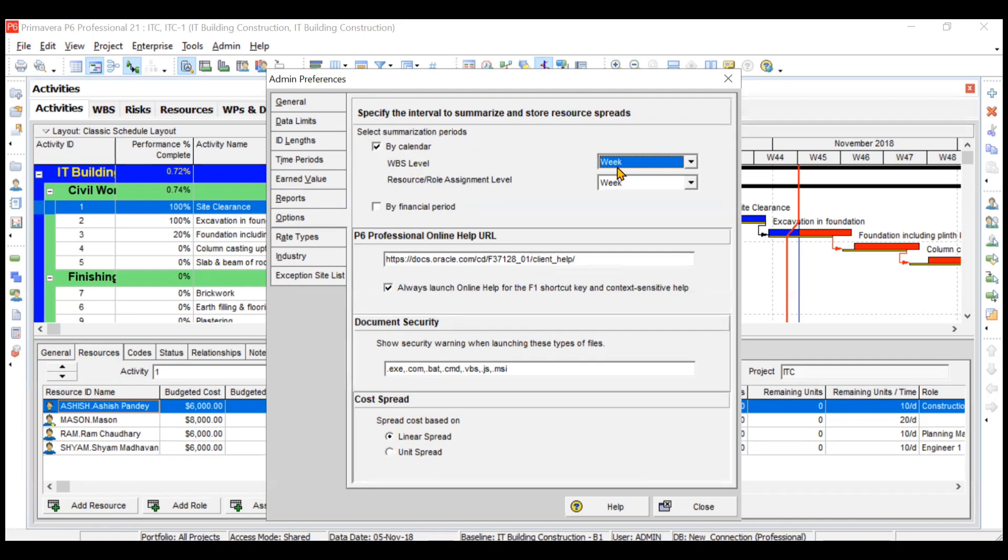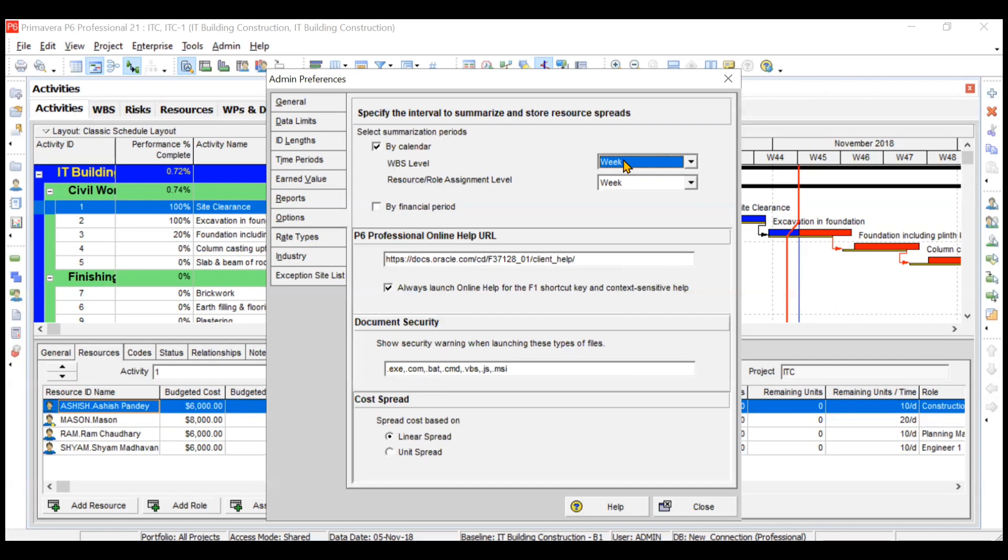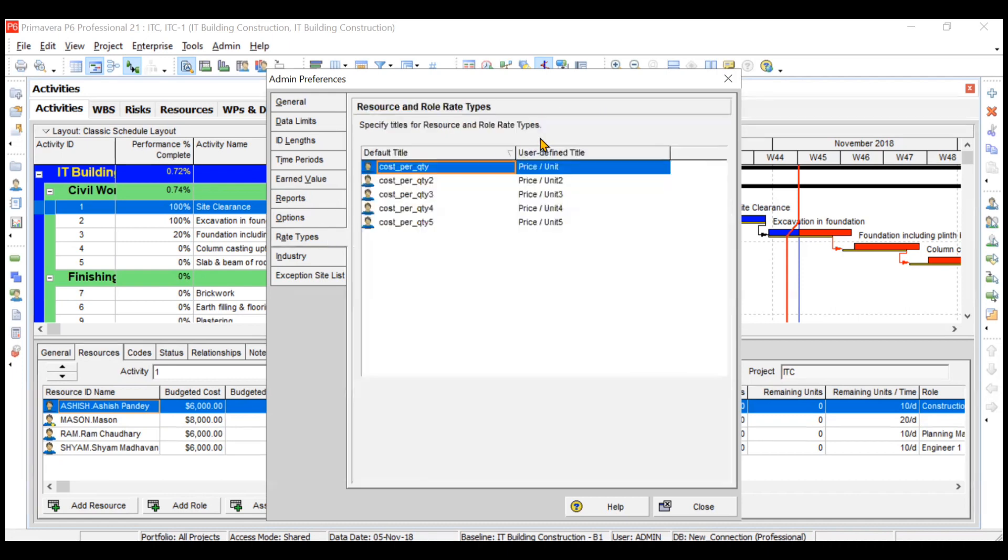Here you have some professional online help. I recommend not changing these websites because these are enabled by the system already. Then rate type. You have some predefined rate types. For example, for some certain activity you have different rates, like from one subcontractor you have some rate, from second you have some rate, from client you have some rate. You can add the rate types, you can change the rate types very well.